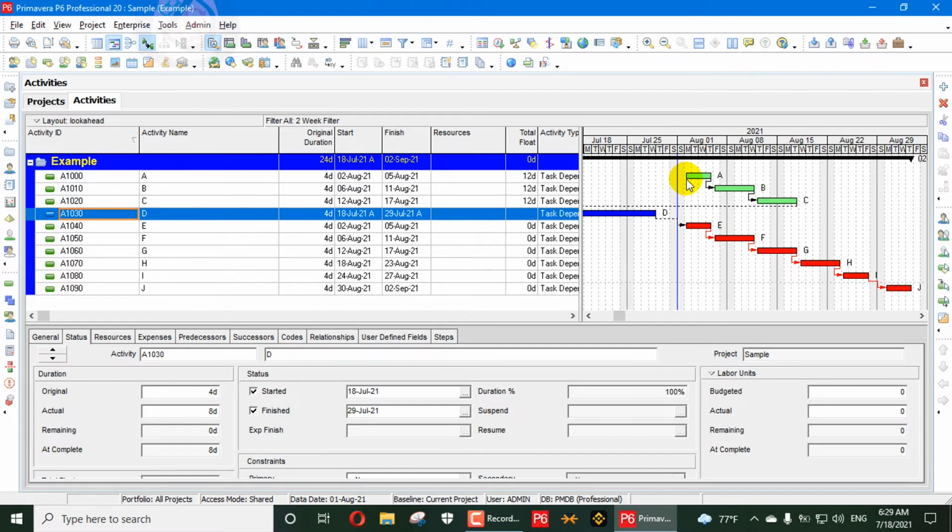For example, some activities have direct constraints in the project, such as those based on an approval, like an environmental approval or a hydrological approval. We need approval from our clients, direct consultation with the client, public consultation, an environmental impact assessment, and other reports which allow the design work. So we continue after that.